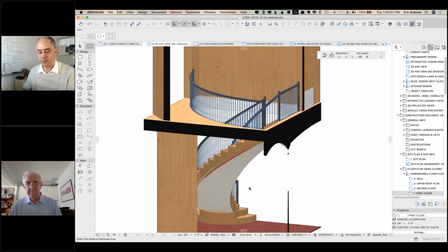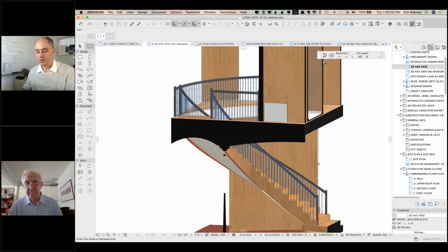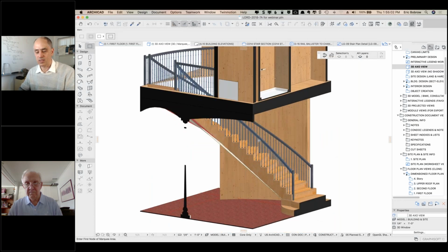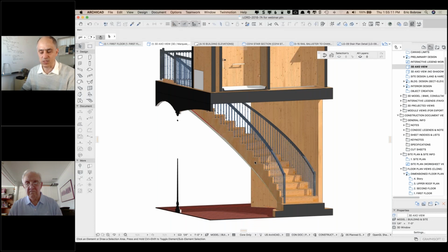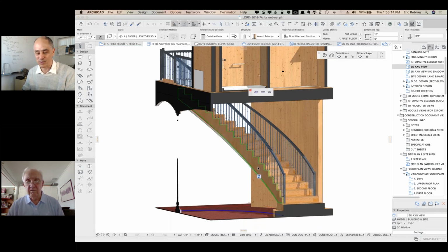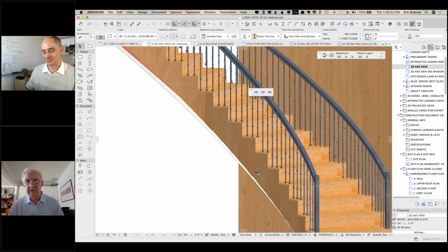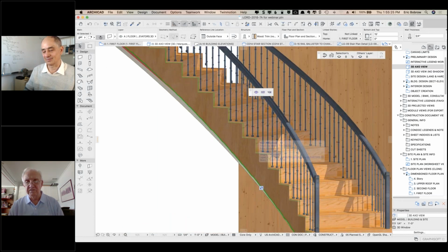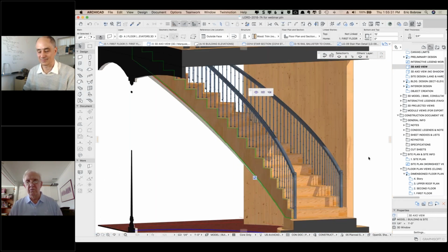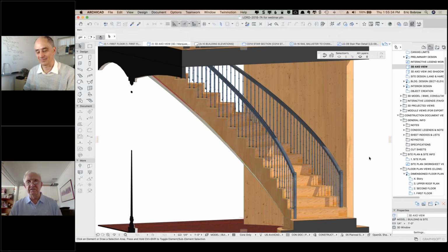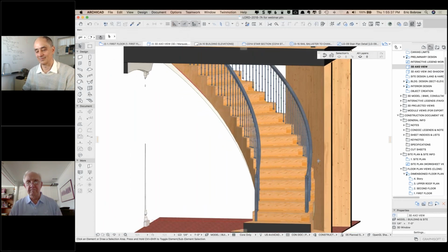So you were saying that creating the staircase itself wasn't that hard, but the stringer was a challenge, and the stringer actually is, what'd you say? It's like a huge cost to get this spiral stringer. There are two stringers, and they're each a 9-inch, 13-pound channel. The first bid came in at $73,000 for the 2 channels and the railing, and the second bid came in at $38,000 for the 2. And so we're in the process of trying to revise how you build the stair and maybe see if we can make a budget out of it. Yeah.